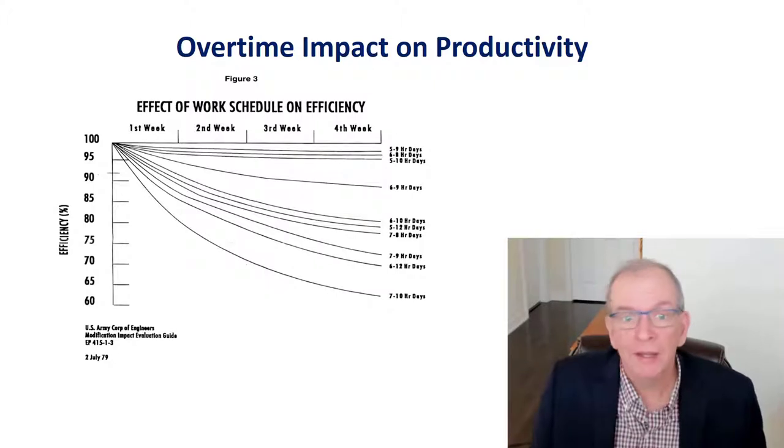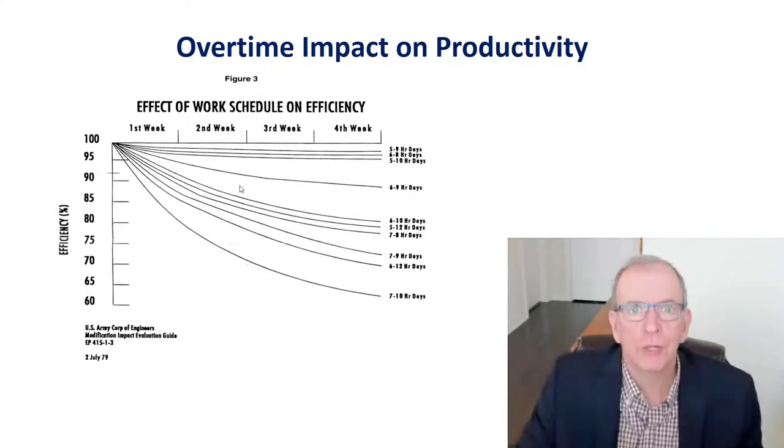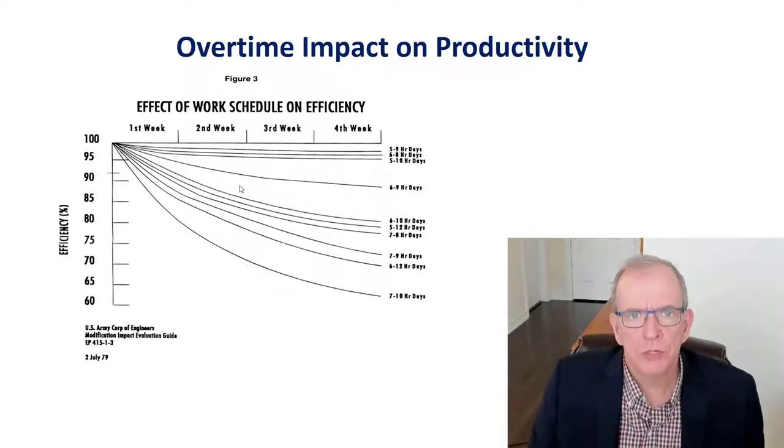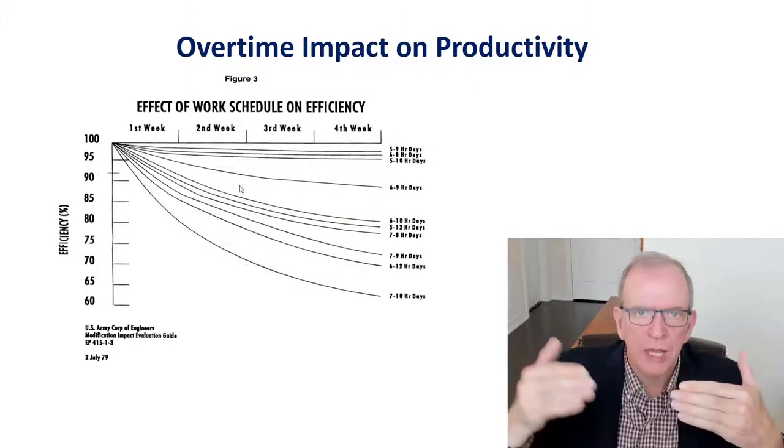And are you able to get an allowance, or in your actual design of your costing, that extra amount if you're planning to work extra hours? If it's going to be for a long period of time, that's probably not the best way to go about it. You might want to consider multiple shifts. But you also have to consider, with multiple shifts, the handoffs. You have to have some overlap in the shifts. Overall you'll have better productivity, but you want to make sure you have good handoffs between the managers in those shifts, so that when one group finishes, the other group knows where they're taking up.